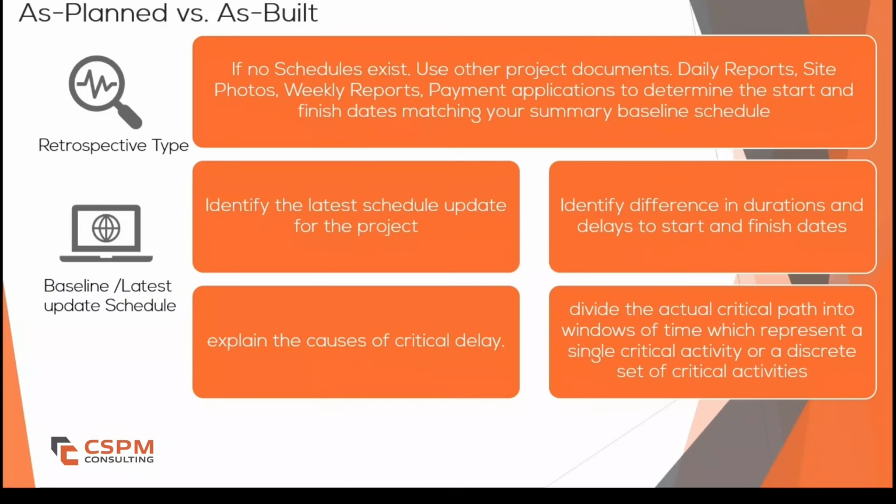Third, compare planned versus actual durations. We analyze start and finish dates, highlighting discrepancies between the planned and actual completion of each activity. Fourth, segment critical delays.